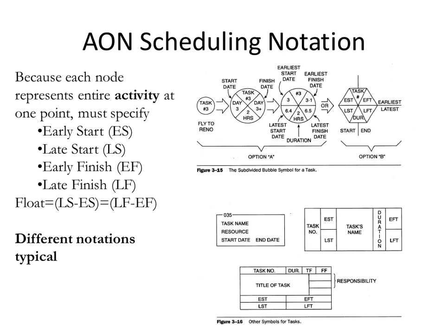You could start it as early as the early start. Can't start it before then. Why? The other stuff hasn't been finished. And you have the luxury of starting it as late as late start without adverse impact on when the project finishes. You can delay up to here for free, so to speak, without delaying the entire project.